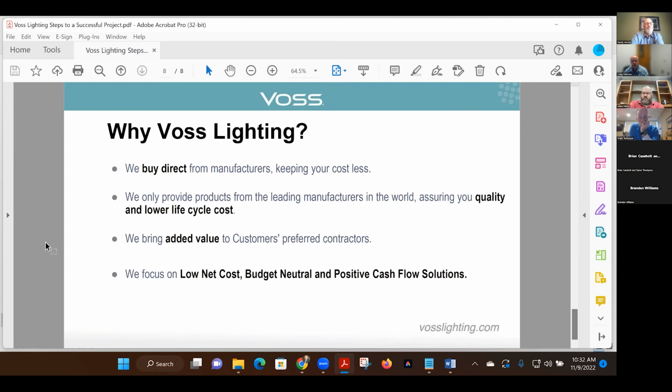And a lot of that is, as we all know, the product on the lighting side isn't too bad these days. We can get most things in 6 to 8 weeks, especially for a school when you're talking lamps or 2x4 fixtures for the gym or classrooms. That stuff's all pretty readily available within 2 months. It's the labor that becomes the challenge anymore. There's not enough to go around. So electrical contractors are booking up all their labor earlier, because summer is your construction months.